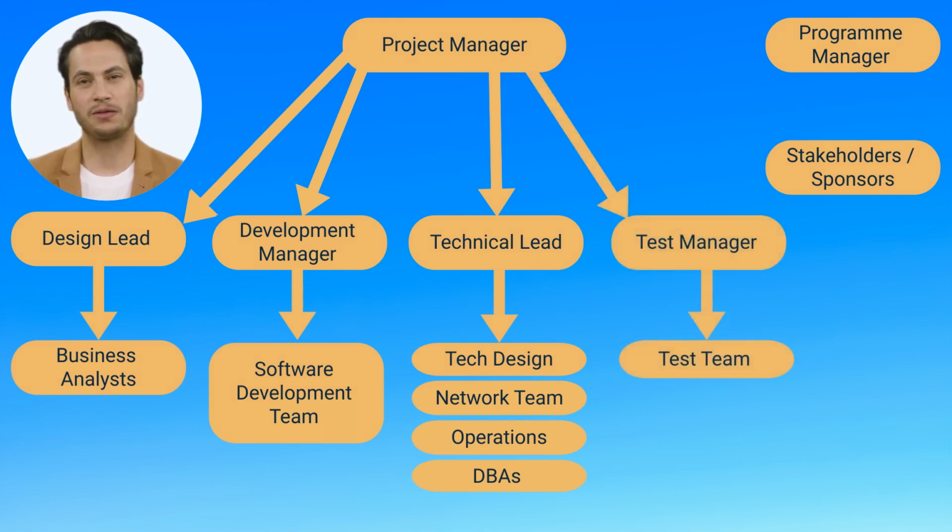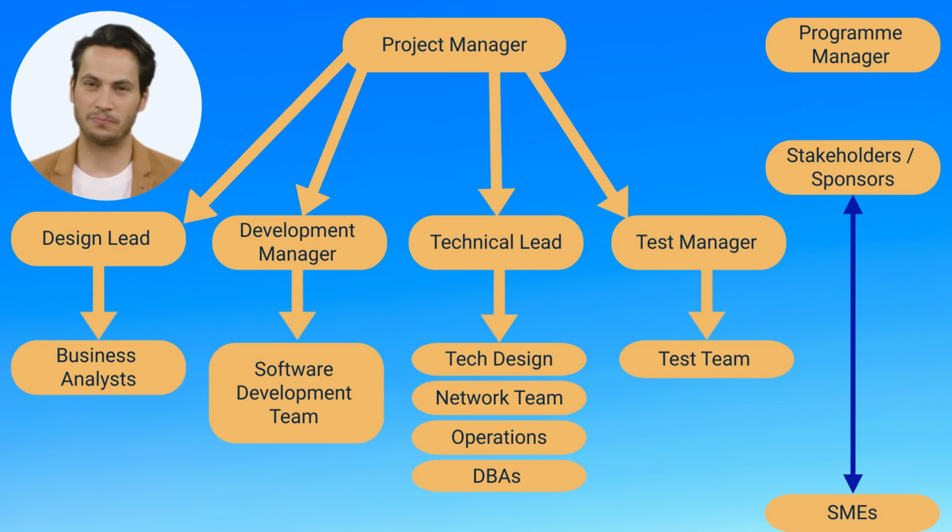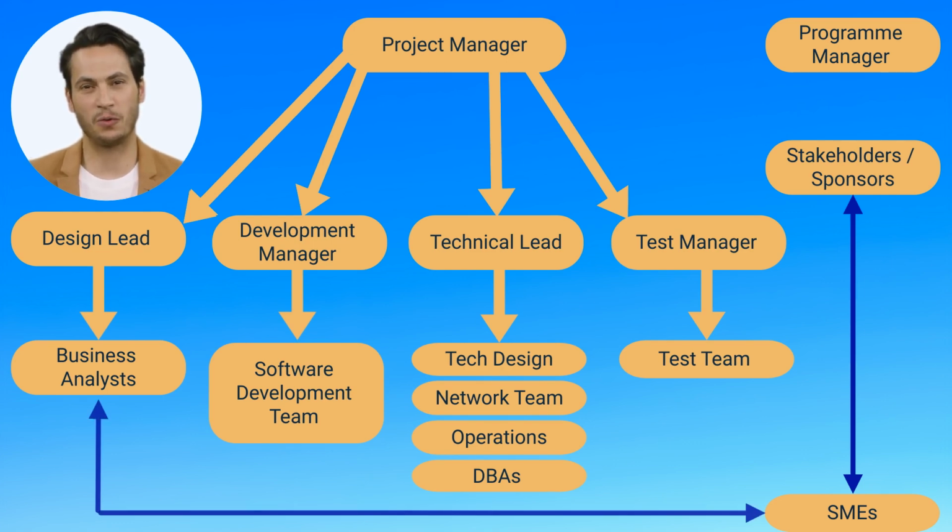There will also be some subject matter experts on the project. They often double up as stakeholders and could have a foot in both camps. Their primary roles as subject matter experts, otherwise known as SME, are firstly to help the business analysts when gathering requirements. They can also be accessed by software developers when they are creating the code. The subject matter experts, which I will now refer to as SME, are often involved in user acceptance testing, which means they also coordinate with the test team.